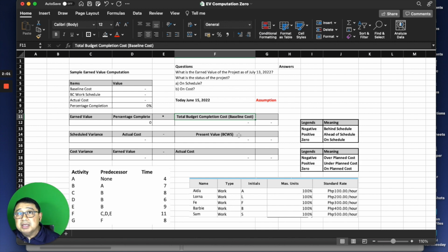And then the third one is the project alongside completion is the cost on time, over or under. So cost variance is equal to earned value minus your total cost. Okay, so let's begin to plot this in ProjectLibre.